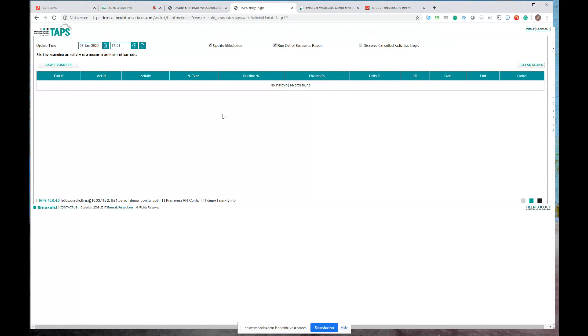So what I'd like to do now is show you just one simple update, first of all, and we will come back to this a few times, because there is a few different scenarios I want you to be aware of. So if I go in and scan my first activity, so there's my first activity. As Sue mentioned, it tells me its duration % complete type. Currently, it's not started. Well, this particular activity, we've finished. So one scan, and it's set to completed.